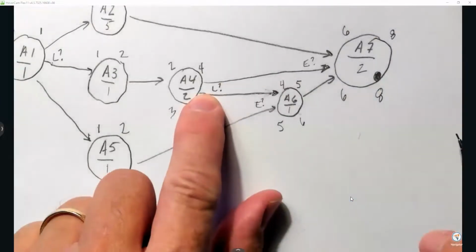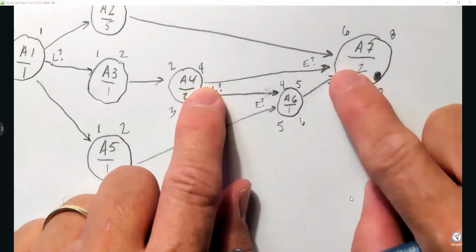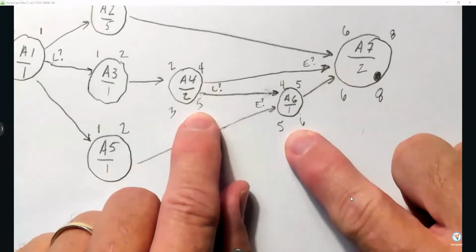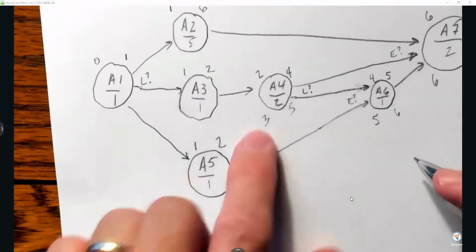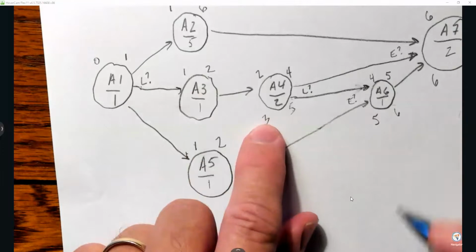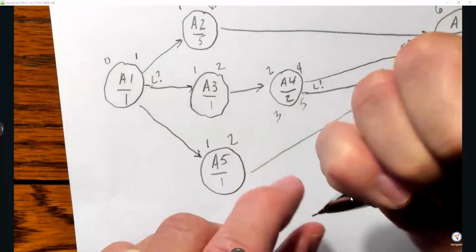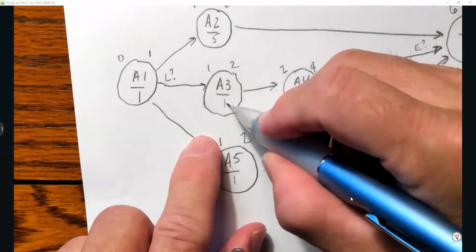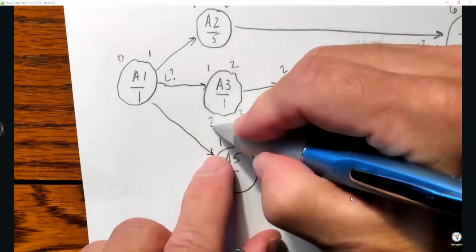Remember, I am saying this number, LS of this one, and LS of this one, because this arrow goes back into it. Is it 6 versus 5? I chose 5 because it's the smaller going this way. So I have 3 to 5. Good to go. No decisions here, so this 3 just goes over to there. This ends up being 3 minus 1 is 2.